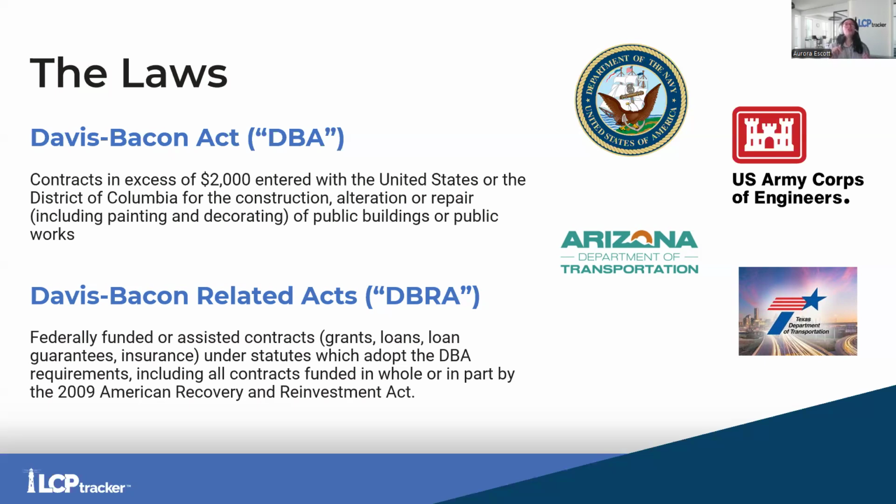So let's just say, I'm going to pick on California because California is my home state. So let's say we're talking about Department of Transportation projects. So we've got federal DOT. Now, federal DOT does not directly contract out with the local populace saying, hey, I want to build an interstate that cuts through several states. They won't directly put out a project to bid that way. Instead, what they do is they provide funds for individual states themselves to build that interstate.